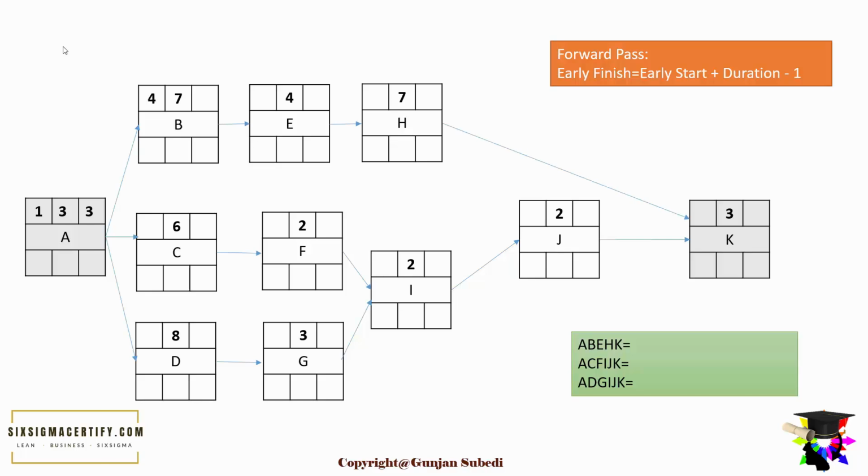So if we complete the project at earliest for the path A in 3 days, the early start for the process B could be 4 days. And similarly, the early start for C and D will also be 4 days because the early finish of the prior step, or the step A, is 3 days. So we put the early start of C and D as 4 days.